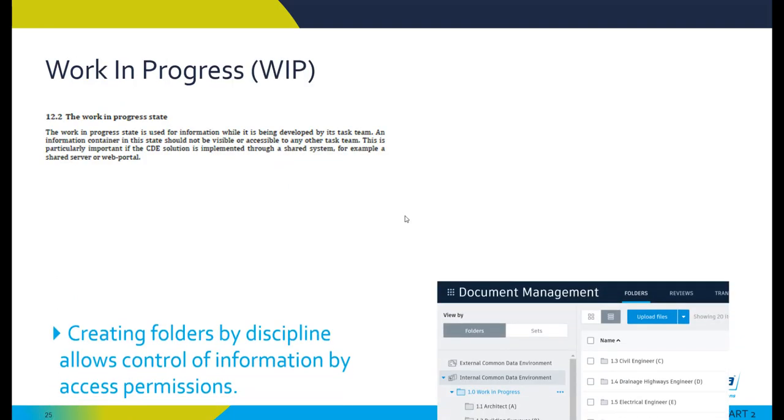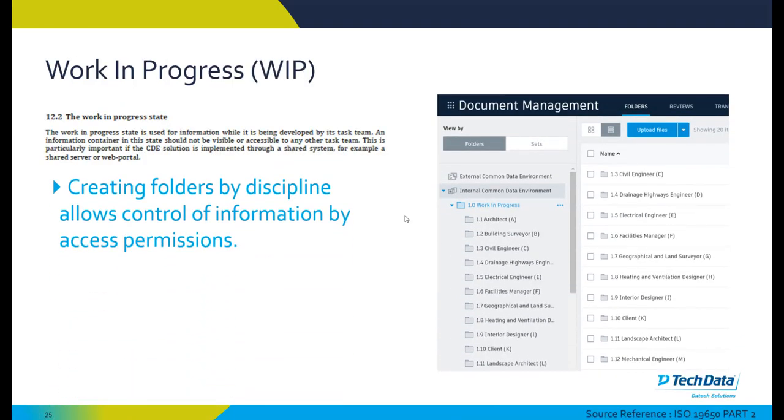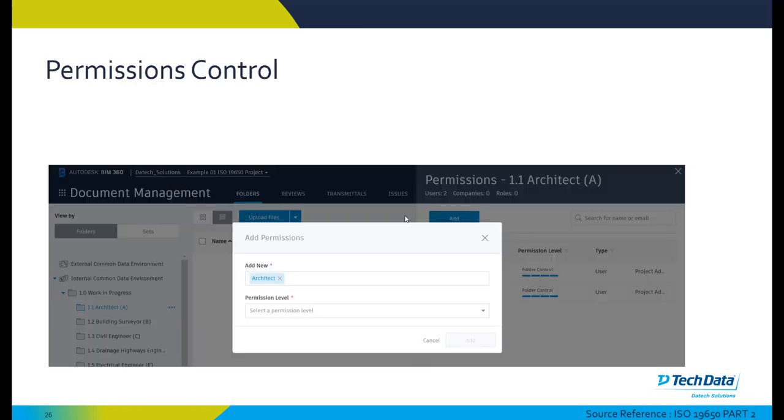The work in progress area, by creating folders by discipline, allows the control of information by access permissions within BIM 360. The permissions control can be assigned per role or per company or per individual, and we can set their different permission levels at the various folder levels.